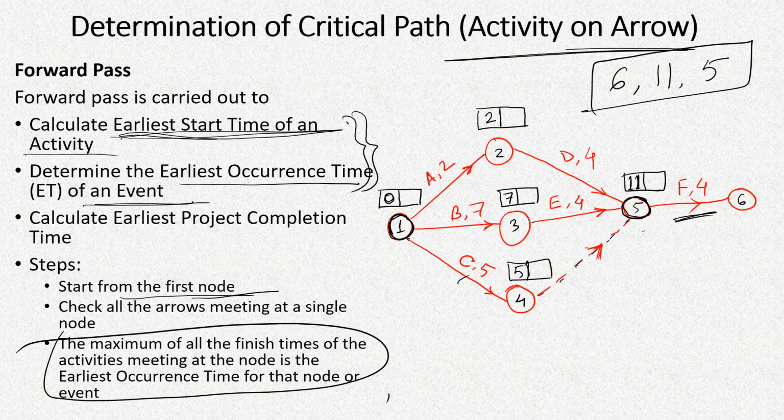That means on 11th day only, all these previous activities can be said to be completed. However, a few of the activities are already completed, but we can say it is arrived only when all of them are completed, and therefore we have to take the maximum of these durations.